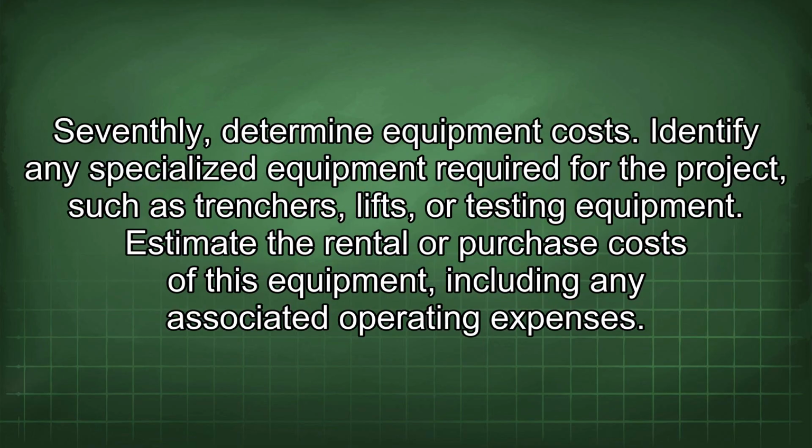Seventhly, determine equipment costs. Identify any specialized equipment required for the project, such as trenchers, lifts, or testing equipment. Estimate the rental or purchase costs of this equipment, including any associated operating expenses.